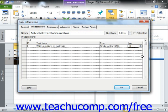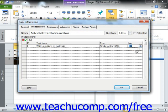In that case, you would simply enter the amount to increase or decrease into the field that's available. Entering a positive value is considered adding lag time, and entering a negative value is considered entering lead time.